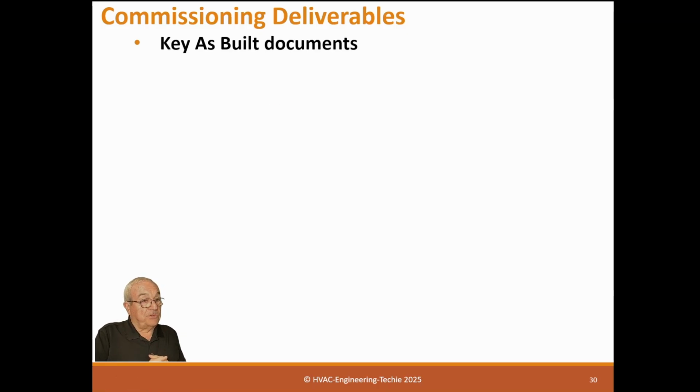So these key as-builts are all the management systems, like the power management system, lighting control systems, all the critical power systems, all those systems that need key as-builts. For some reason, I don't know why, as-builts never get to operators. Either they aren't created or they don't get there. By putting them in a system manual, you assure that they are going to get there.